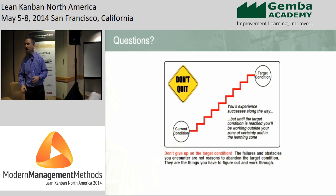Yes? Can you talk a little bit about the cadence of your coaching kata? How frequently did you do these coaching kata sessions? Was it multiple times a day, multiple times a week? What was that like? So it depends. On this particular job, I only visited that job once a month for a week. And so the week that I was there, we typically would walk 3 times during the week and try to improve things or go look at a different problem each time. On other jobs, it can be as frequently as a daily walk, but it just depends on what problem they're trying to solve.